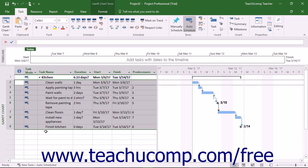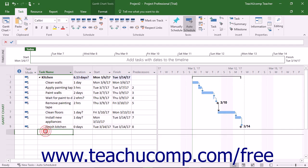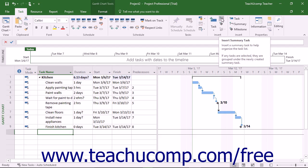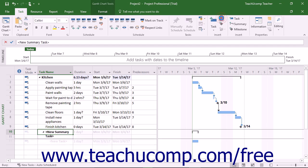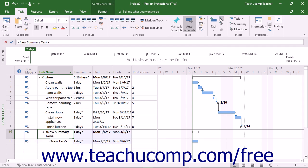To insert a new summary task and its first subtask into a project file, click into a blank task row and then click the Summary button that appears in the Insert button group on the Task tab in the ribbon. Then enter the names of the tasks.